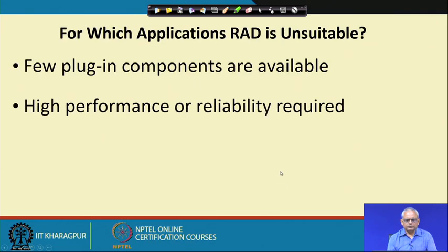Also, for the RAD model to really work, we should have many reusable components. So, if there are no reusable components, that is, a new product where reusable software is not available, then the RAD model will be unsuitable.